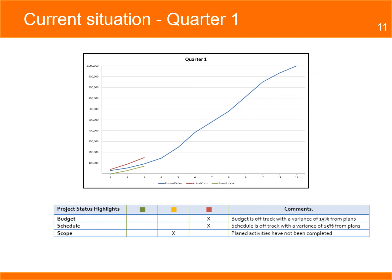After the project manager left, he submitted the status report for the first quarter. The information was not good. The status shows the budget and the schedule have a red flag, while scope has a yellow flag. The actual costs are higher than planned and the earned value is less than planned. The CPI is 0.47 and SPI is 0.76. Additionally, the first milestone is late. If the project continues with the same trend, it is possible that it will not be successful.